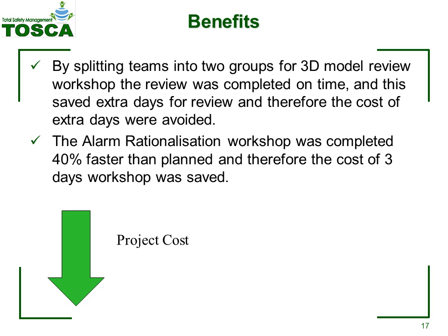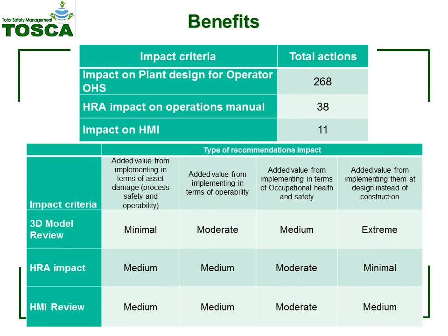The same benefit was gained during the alarm rationalization by completing the review earlier than planned and therefore saving the cost of 3 workshop days that could be estimated at a daily rate of €3,000. This simply can be defined as €9,000 saving for alarm rationalization workshop and avoidance of the extra €10,000 cost for 3D model review. In terms of the recommendations and the input provided by HFE team for the projects, it is difficult to provide concrete cost effectiveness evidence.